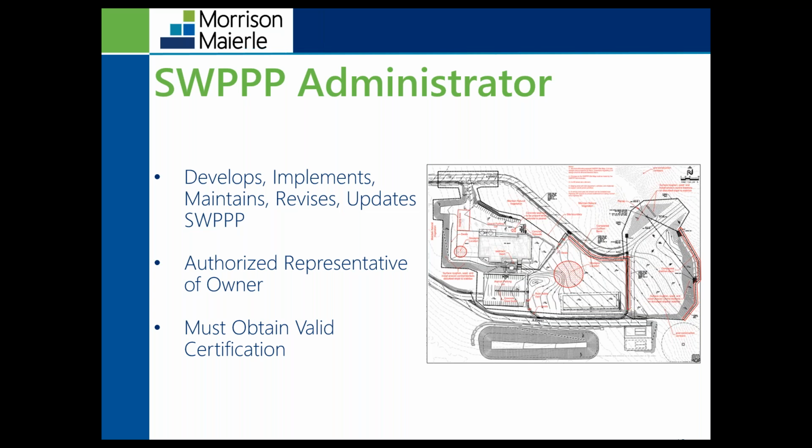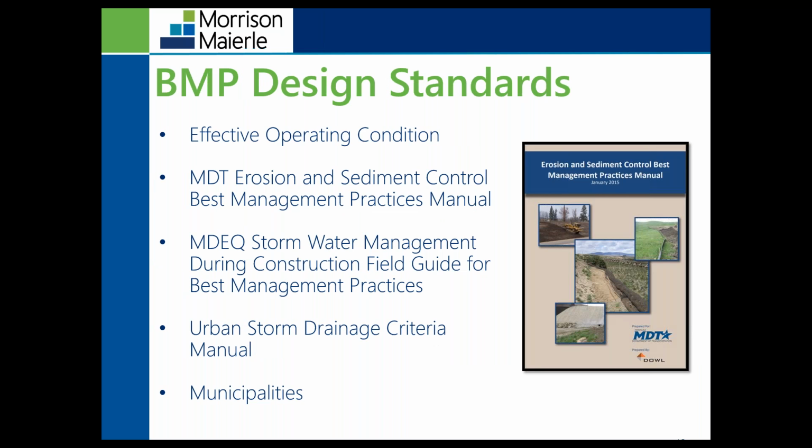So as part of a SWIP administrator, they're going to be performing inspections, making sure that BMPs are effective and in effective operating conditions, trying to minimize pollutants from discharging from the site. So when a SWIP administrator is performing their inspections, they're going to be making sure that BMPs are in effective operating conditions, and BMP design standards will identify if BMPs are in effective operating conditions. There's a few different design standards that you can use.